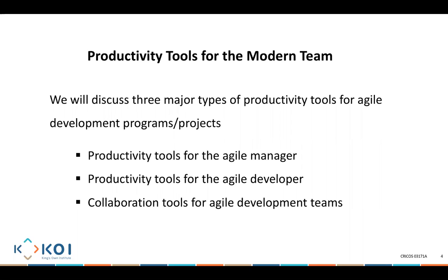the team meets every single day in what is called a daily Scrum meeting. That daily Scrum meeting has an objective. The objective is we want to identify what we have done last time, which is yesterday. What are we doing today, so our current work. And what are the actual things that are stopping me from achieving my progress? So three things I need to look at: what we've done yesterday, what I'm doing today, and what the blockages are.